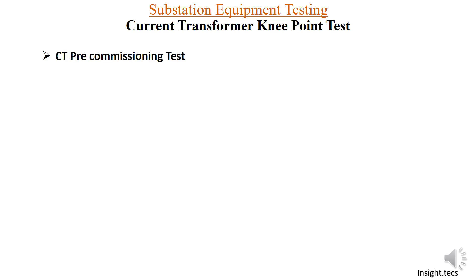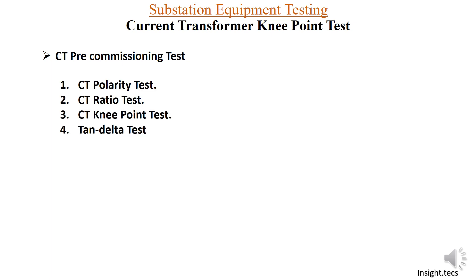There are various tests that are performed on the current transformer before commissioning of the CT is done. Some of these tests are: CT polarity test, ratio test, knee point test, tan delta test, and IR value test. In today's video we will be learning about the knee point test.